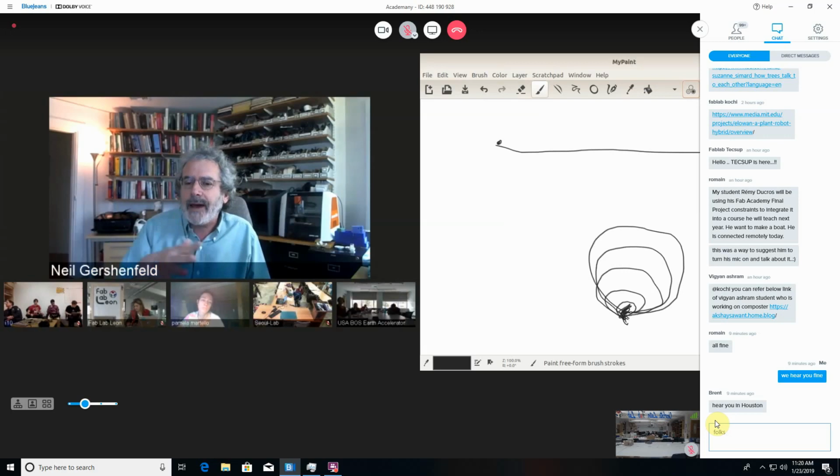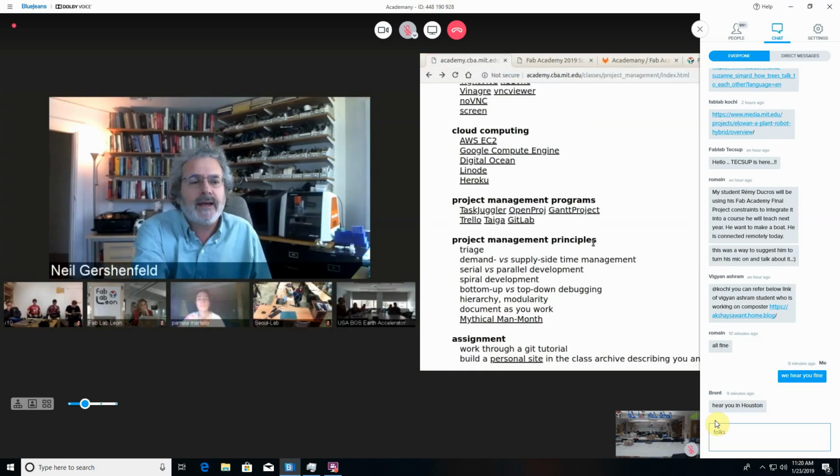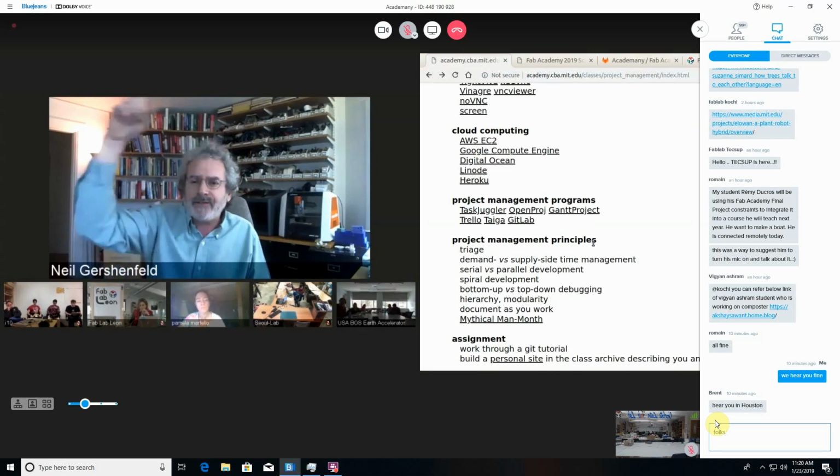And so if we go back to some of the final projects we heard, the composting system, the first version could have no compost and just have the container. A second version would still not have compost, but would have sensors. Then a third version would introduce the materials in it, but not compost it. A fourth version would actually make compost, but not control it. And then a fifth version would actually make compost and control it. But the idea is each spiral goes back to a complete system, and then you add capability to it. And by looping, it's a very different way of working where you keep getting a chance to refine the development.